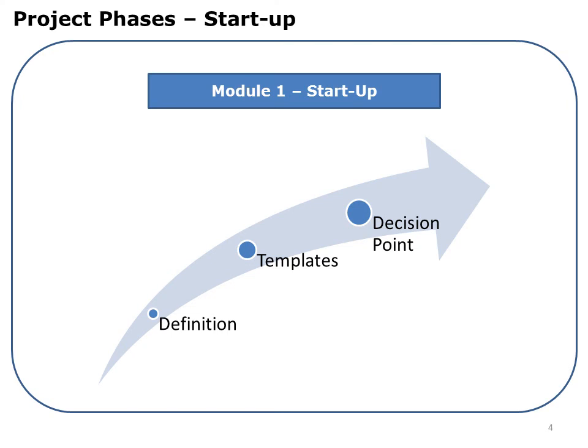Now, a brief mention about decision points. Once the startup stage is complete, I would recommend holding a decision point meeting. This meeting will signal the end of this stage to your team, to your main stakeholders, and this is where you are seeking approval from them to proceed to the next stage. In this case, it will be the initiative stage.